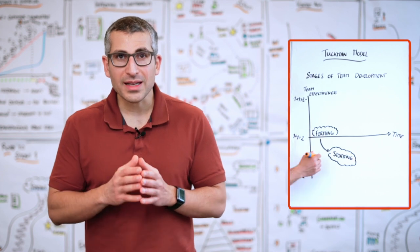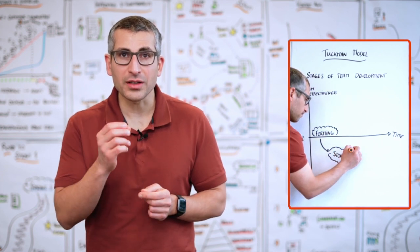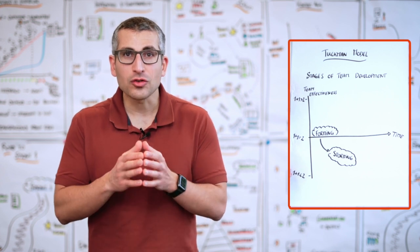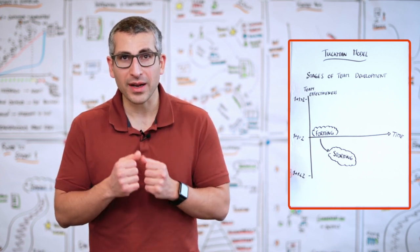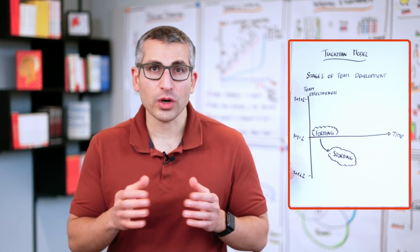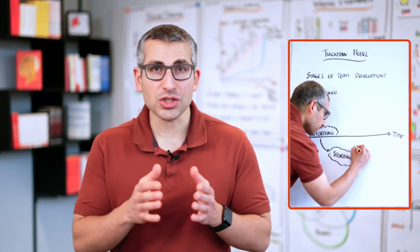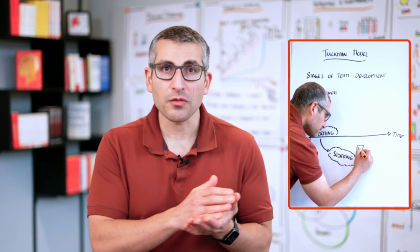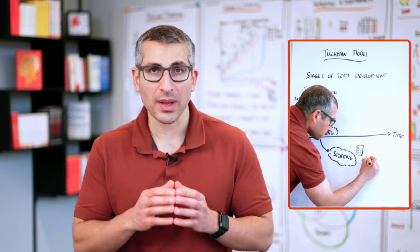The storming phase is a great opportunity to understand what are the things that you need to tackle first to make your team more effective. Once you identify those things, once you start creating working agreements, once you teach everyone about their role, about their responsibilities, the team moves from storming into norming.